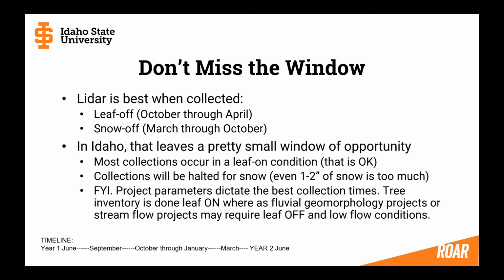Don't miss the window. Okay, so now we're talking about a temporal window. Notice we're now in the year 2, June. It's the full year around. LiDAR is usually best when collected leaf off and snow off. In Idaho, that leaves a pretty small window of opportunity. Most collections do occur in leaf on condition. That's what we're finding, and that's okay.